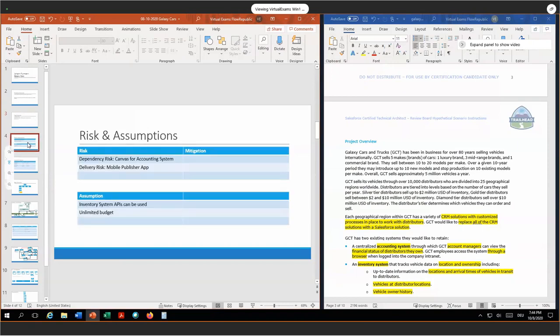For actors and licenses, and for risks and assumptions, I see two assumptions. First, the inventory system APIs can be used — we have to make sure that this works, so we have to test that early on. For risks, I see the dependency risk to build on Canvas to adopt the accounting system to have Canvas SDK support, and the delivery risk for the mobile publisher.